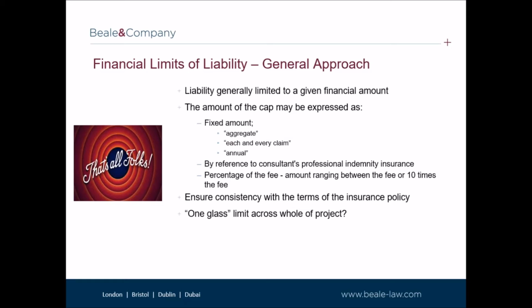From a liability perspective, as professional indemnity insurance is usually expressed on a per claim or each and every claim basis, it means that the consultant will not achieve the aggregate financial limit of liability cap, which should be preferred. Also, it's fundamental that the drafting of such a clause works, which in our view is not always the case.